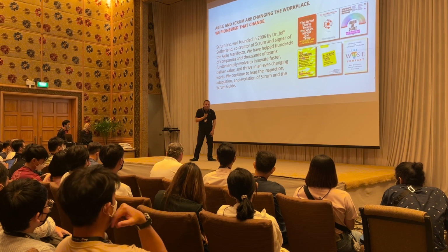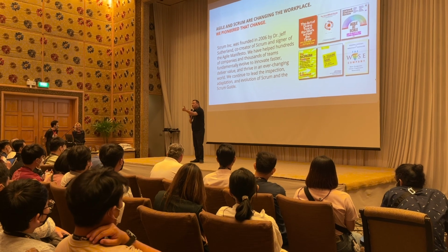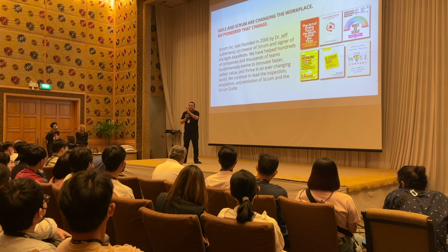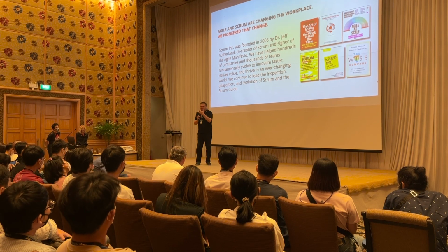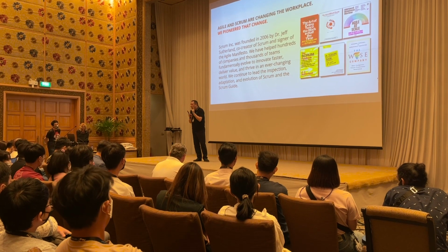Yeah, so team structure is a really important one. So you really want to have a small team and a stable team. By small team, Scrum supports 3 to 9 people. You can pick any number of people in your team, right? But the best number is 4.6.